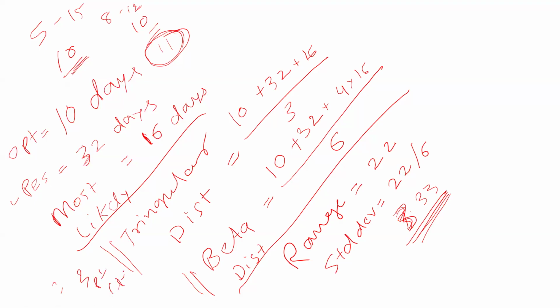Now, there are 2 ways to calculate a 3-point estimate. One, which is not very common, is triangular distribution, where you take the arithmetical average. What does it mean, Swati? It says that you are giving equal importance to all: that senior guy, that junior boy, and whatever your views are. Giving equal weightage, you are going with that. Not a bad idea. See, Swati, if you listen to only optimistic, your project will overrun. If you listen only to the pessimistic, you may not get that project, Swati.